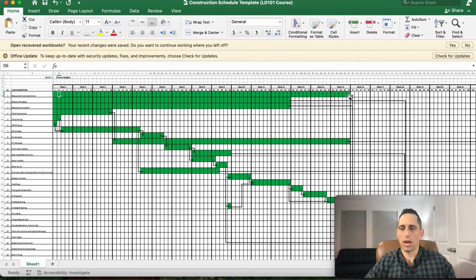And then they call and say, "Oh, hey, no, but we don't have all the material yet." And then you're just left sitting there and wasting time, because then they order it, and that's when you're waiting 15 weeks or whatever it is for them to get the material, when you could have done that from the very beginning, right? So long lead items are another crucial thing that you have to keep in mind when you're putting your schedule together and sequencing your events.